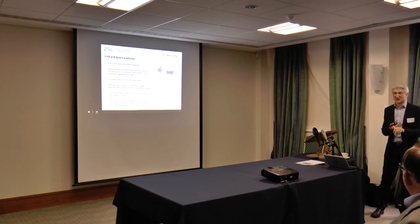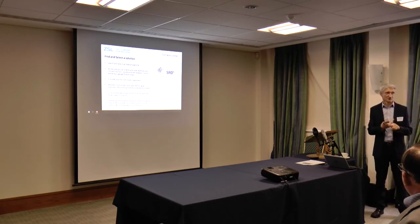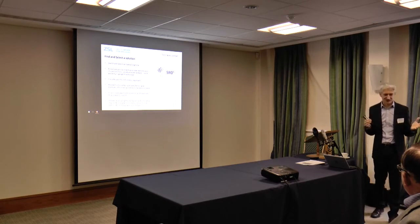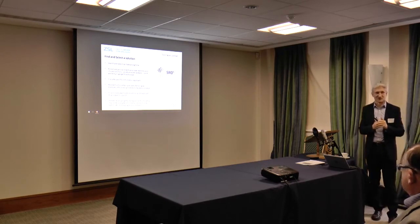tried to take the view that actually we're not going to do any customisations. We're going to change the way we work to suit the way the system works, and we will configure as much as we can. In the end, we did need customisation, not a huge number. We did change the way we work, and we did do lots of work on tailoring it. But again, that's one of the key components, I think, for understanding how it fits.